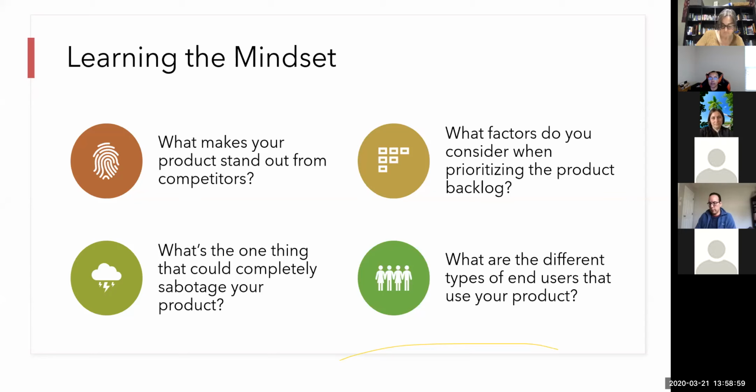And then, what type of end users do you have? And this can help your product owners with actually separating and splitting stories and splitting work. They can actually say, oh, you know what? I'm only focusing on these end users, and that's all. Yes, there's some secondary end users here, but on this particular thing, I'm going to focus on these primary end users. And that's another talking point of saying no to individuals and helping your team understand how to not gold plate things, because you're saying, well, yes, I understand that, they can help this type of end user, we could do these things, but that's not my goal.